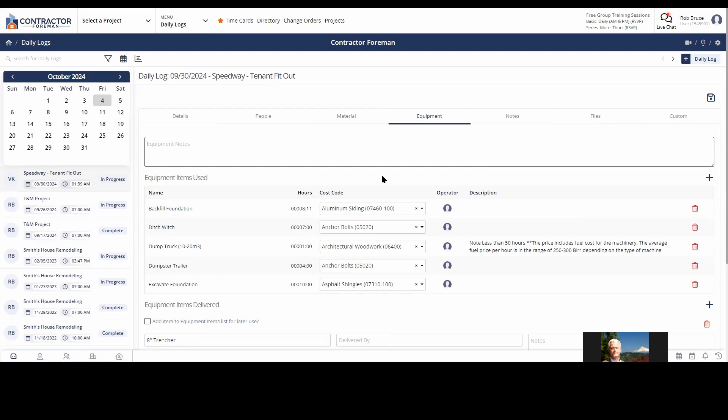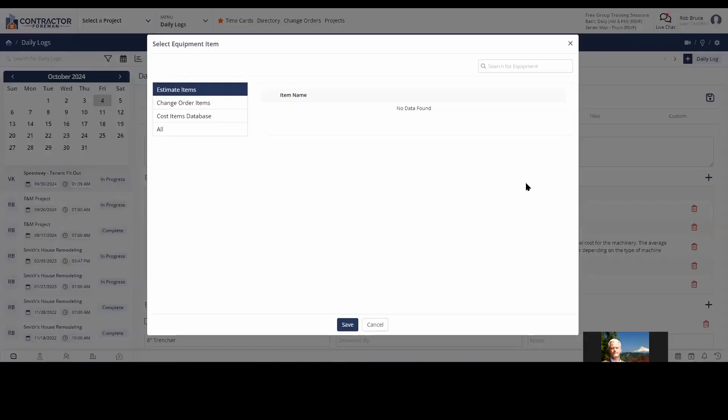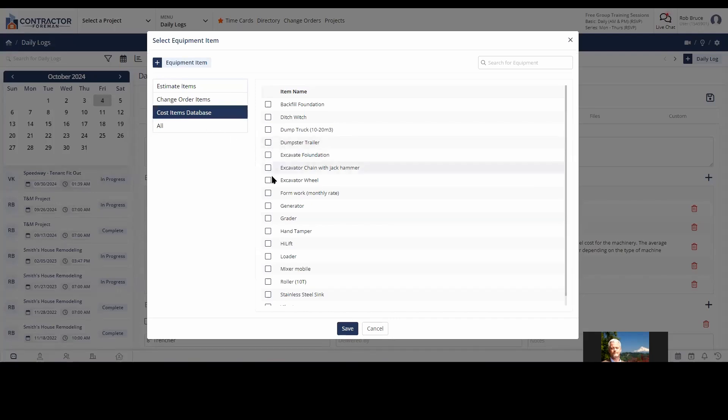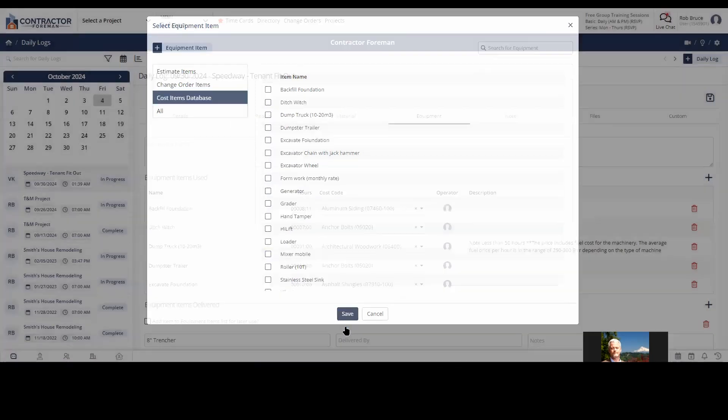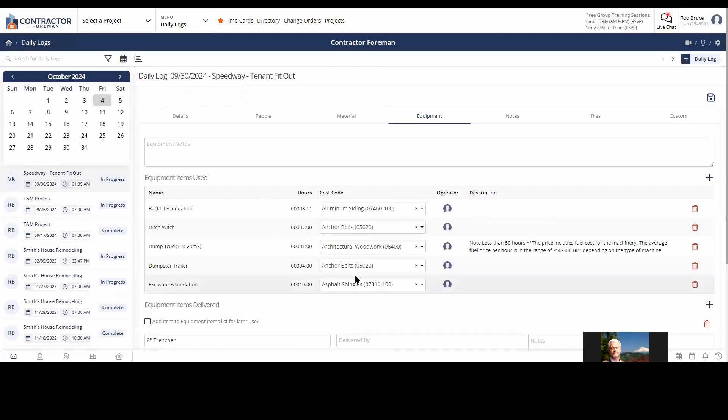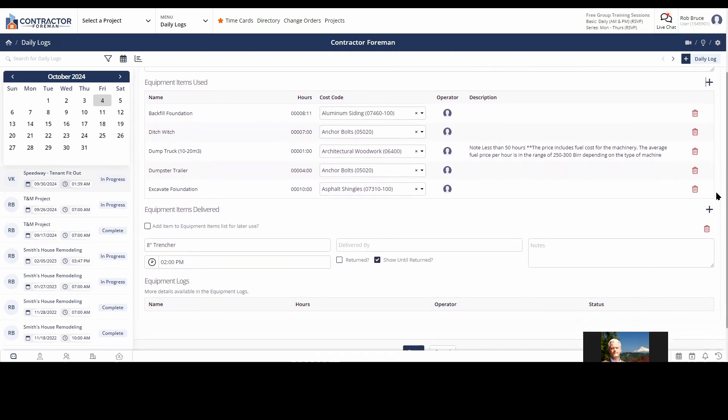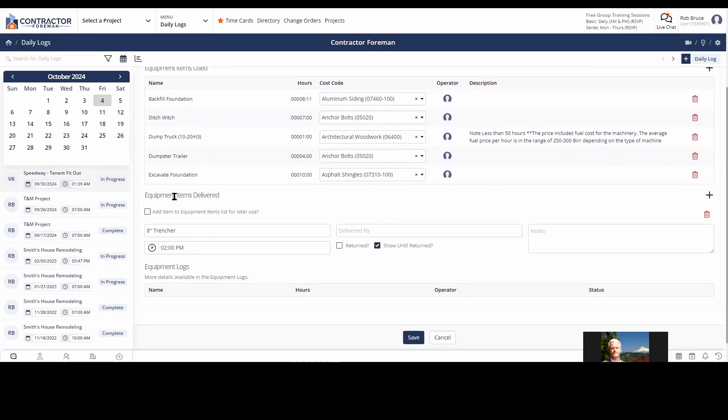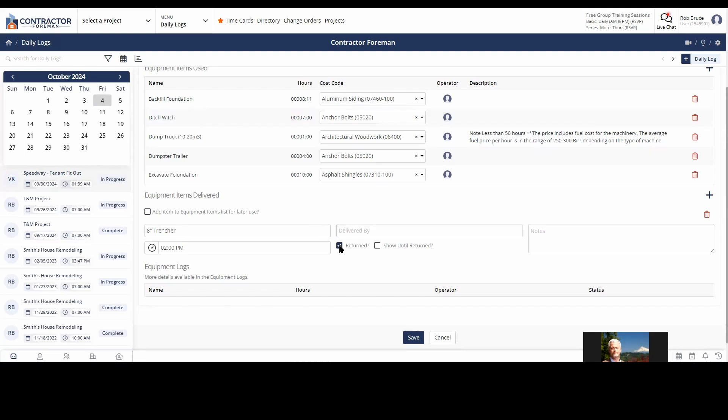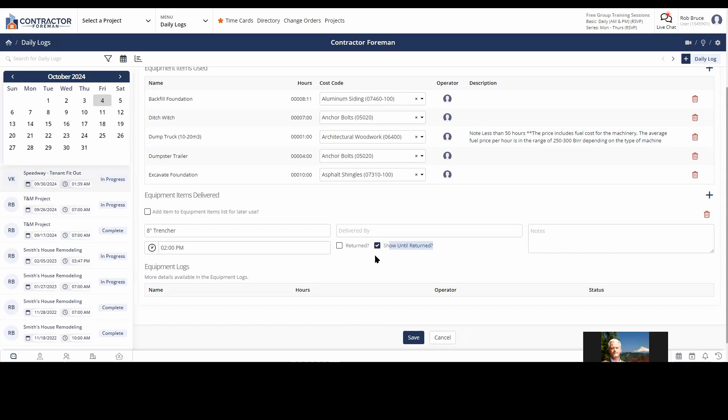The equipment really works about the same way as material. Very similar. Equipment notes. We've got equipment used. We do job cost our equipment. So I can say, was it from a change order? Cost item database or just bring in all. Say cost item database. Select what equipment it was. Bring that in. And I've got my high lift delivered. Or I should say used. Then items delivered. Equipment items delivered. So I said, we've got an eight inch trencher who delivered it. And two important little checkboxes here. Was it returned? So a piece of rental equipment or show until returned. If I click this, next time I do a daily log, it's just going to leave that on there because I'm using it for numerous days. There's no point in every single day having to go add the eight inch trencher. All my equipment that's just going to be on the job until I say it was returned will just auto populate every single day.